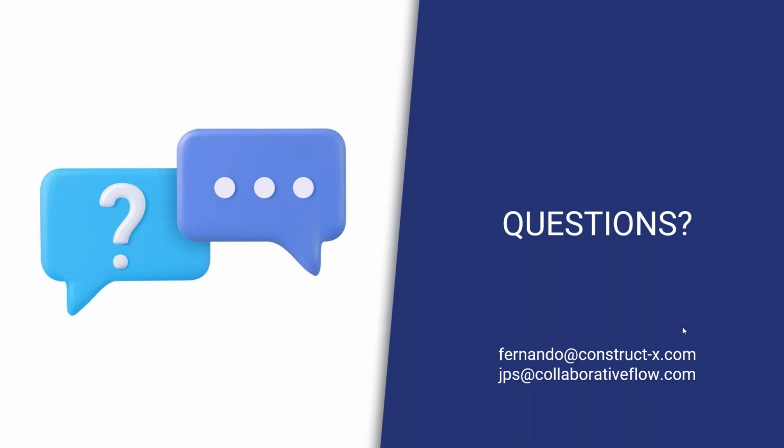So there's a whole installation work package content process that is critical to this. But that would take another webinar. Maybe that's going to be a topic for another one. Or in the lean world, the last planner is typically a foreman or someone very, very close to the foreman that's going to develop that. But in the AWP world, it's a Workface Planner. On the CWP side of the equation, there are CWP coordinators or AWP coordinators. That's their responsibility to help organize the engineering teams at the CWP level, the procurement teams, the site teams, the vendors, the project controls, to actually develop that as well and release the CWP downstream to the field.